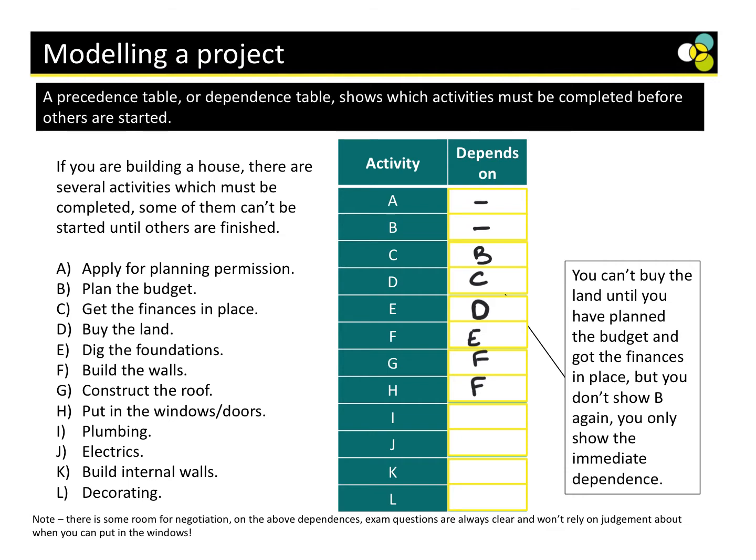What do you think we need for plumbing and electrics at least? We need to make sure, have we got the roof? Have we done the windows and doors? Yes, because we don't want to put electrics in if it's not sealed. So for the plumbing, we need to definitely make sure that the walls are built. And then for electrics, we're going to have to put the electrics in once the windows and doors are complete, so they don't get wet.